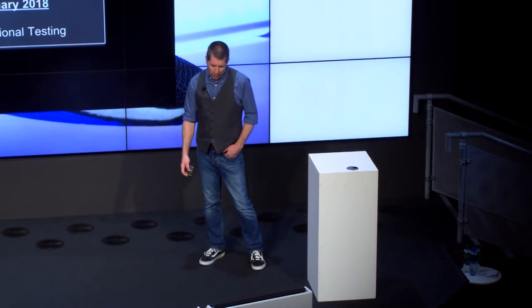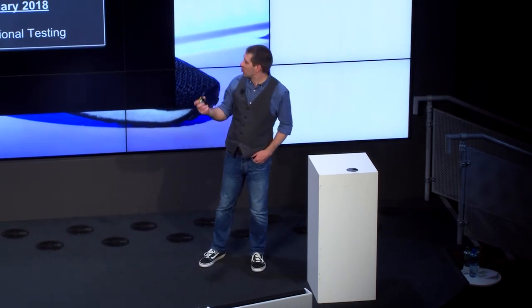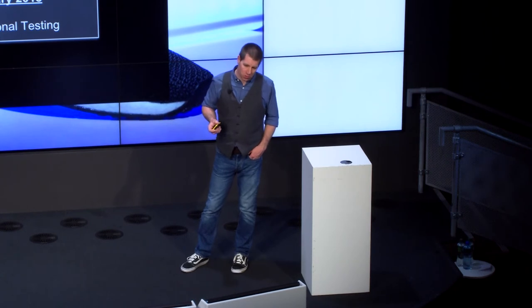This was full on. And then in February, we were starting to get some pages through, and we were functionally testing that as more changes were being applied. This took, you know, a couple hundred man hours. In fact, no, a lot more than that. Probably 300-400 man hours of just functional testing on the website. It was a big change.